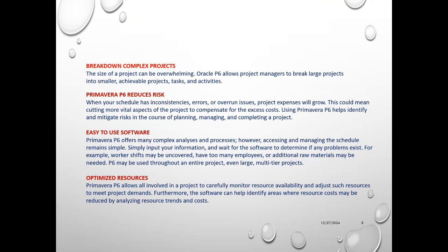So he's asking, okay, give me the resource allocation for the manpower, the first and major one. When you show that, at one point of time in your project life cycle, you see only the peak. The peak is very important. When you see the peak, you find that there are 3 months during the project life cycle when this particular resource is at peak, and you need to deploy around 200 resources per day to complete the project on time. Your organization is telling you that no, we cannot give you 200 resources per day. We have a maximum, we can give you only 150 resources. So no problem, you can use Primavera. Again, using the software, we can do two methods. One is called leveling, the other is called smoothing.